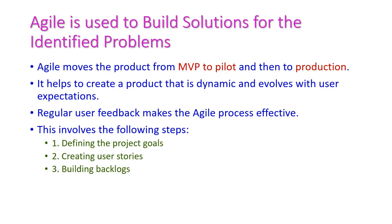Agile is used to build solutions for the identified problems. It moves the product from the minimum viable product (MVP) to pilot and then to production. It helps create a product that is dynamic and evolves with user expectations. Regular user feedback makes the agile process effective. This process involves the following steps: first, defining the project goals; second, creating user stories and building backlogs.